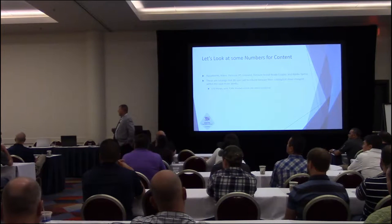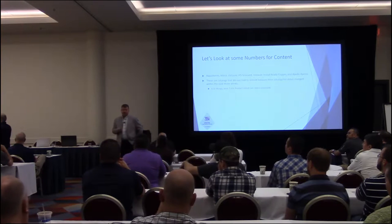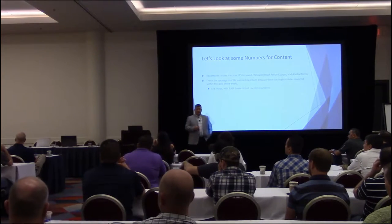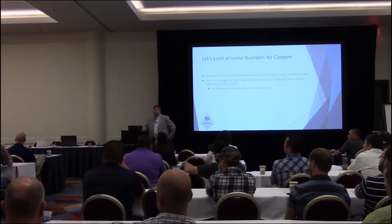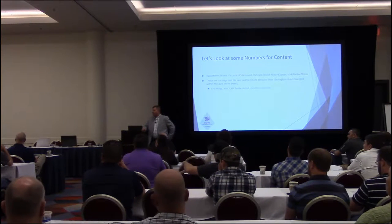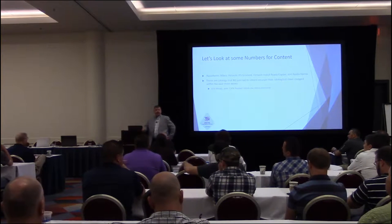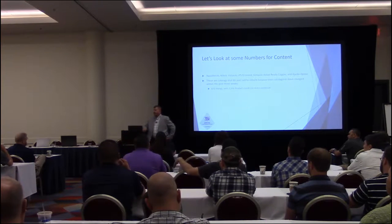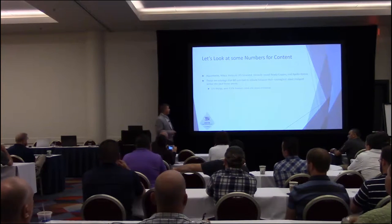What some other companies have done is reach out to their vendors and specify that at this particular date, we no longer want to receive the old ones you may have in stock, say it's a 90 or 45, whatever it may be, at XYZ date. We want to start receiving the new product line. I don't care how many of the old ones you have left, but from this day forward, we want to start receiving the new ones, and they start using the new ones and phasing out whatever they may have in-house of the previous ones. Right. Ship it to your other customer, not to us. As of this date, we're producing spool sheets with the new content. Okay? Ship it to somebody else if you have leftovers, because we don't want them anymore, right?